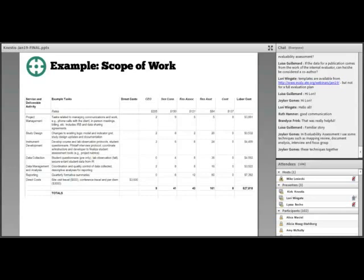Okay. All right. Tell you what. Let's do this. I'll put together a revised version of the task and cost table and do all of the math based on our hourly estimates of what's going to be required to do the focus groups and not do the things we've talked about. I'll send that to you, and your team can look at it. And if it all works out and we're able to make it within the budget, you sign off on it and we'll move forward. Sound like a plan?